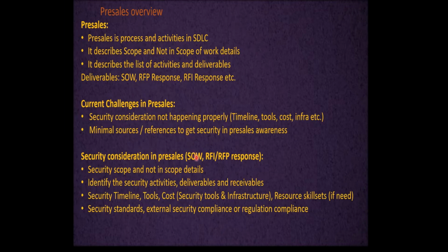Okay, security consideration in pre-sales. When we create the SOW, RFI, RFP response, how we need to consider the security activities, that angle we can see. Security scope and not in scope of the project. Identify the security activities, deliverables and receivables. Security timeline, tools, cost, security tools and infrastructure aspects, resource skill set if needed, security standards, external security compliance or regulatory compliance if required. So these considerations majorly we need to do when we create the proposals or RFP, RFI response.